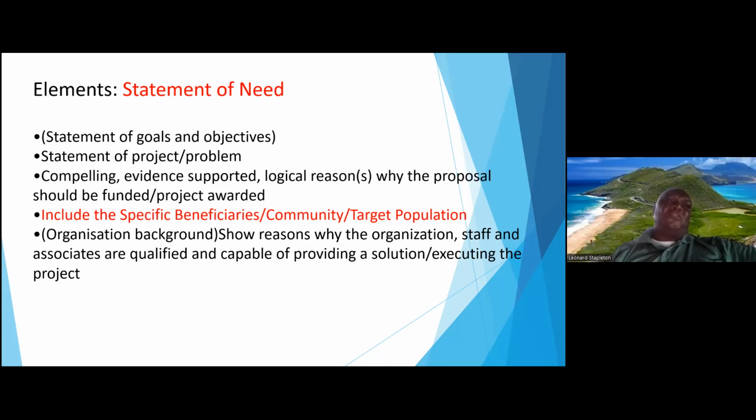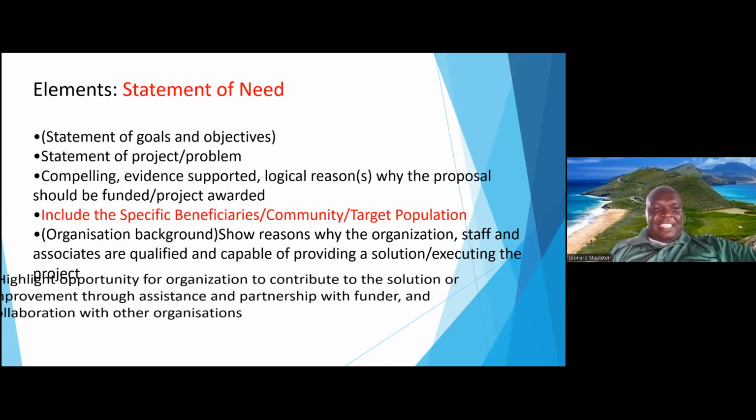So everything that you're going to get for free, whether it's goods or services, you still have to put the actual cost. It's best because some funders ask that a percentage of the funding be in kind. So you have to come up with that. Sometimes some people get the government to give duty free and all this stuff, and that could take care of the in-kind section. But for all the help you're going to get from different people, you put the cost of it, even if they're not charging you.